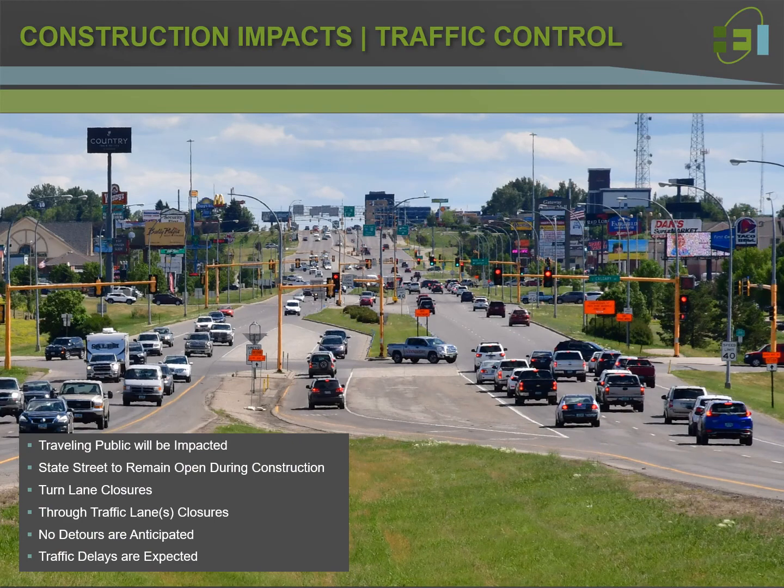In order to construct the proposed improvements previously discussed, there will be impacts to traveling motorists. Although State Street will remain open to traffic during construction, work zone traffic control is anticipated to require closure to turn lanes and to through traffic lanes during specific work activities to allow crews to safely complete the proposed improvements. Flaggers may also be required to direct traffic through the work zone when necessary. No significant traffic detours are anticipated. However, traffic delays can be expected in construction work zones.